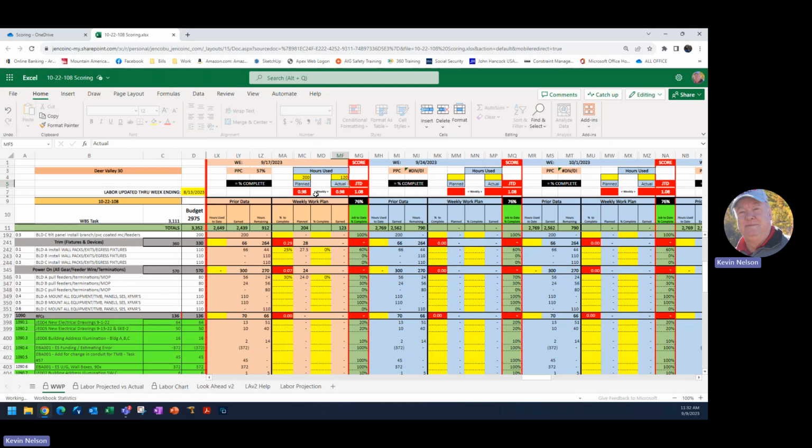So that gave us a final par score for the week. This is the weekly par score of a 0.98. So let's just assume that everybody showed up, and we did in fact work 200 hours. So those 200 hours are actually going to go here, and you can see we earned 123, but we worked 200 hours, which gives us a weekly par score of a 1.63, and that's just math. 123 divided by 200 is 1.63.